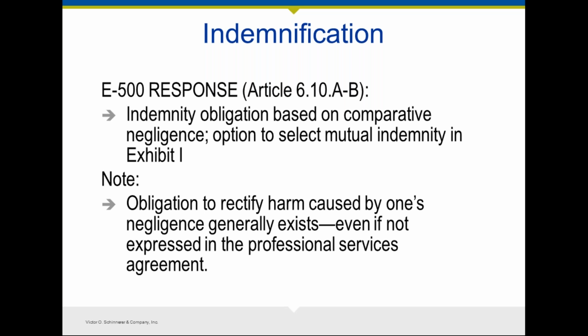Remember that the indemnity is really, in this case, intended to apply to third-party claims, not to the owner. Your obligation to rectify harm to the owner caused by your negligence is there even if there's no indemnity obligation; it's implied. You are indeed expected to make them whole for your negligence. What we're trying to address here are third-party indemnity claims.